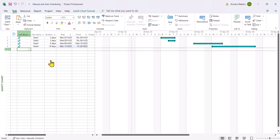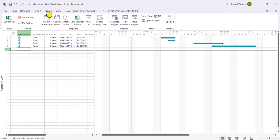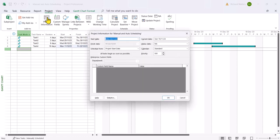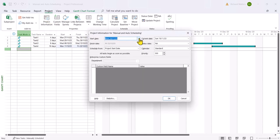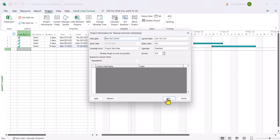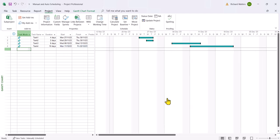But say now you want to update the entire project and a new start date is set and you want all the tasks to update accordingly. Manual scheduling will not work with this so I'll just demonstrate. So if I'm going to change the project start date, project tab, and I can then use the project information and I'll just set the start date to, let me go into December, and I'll click OK and nothing changes.